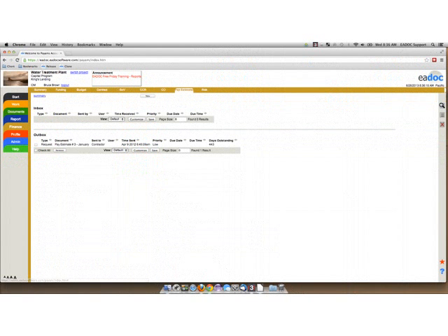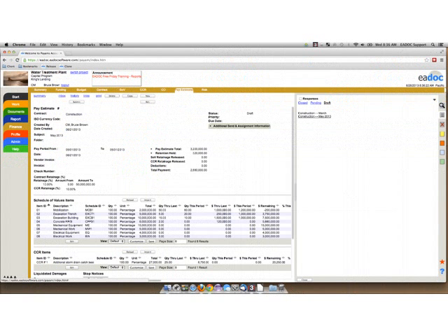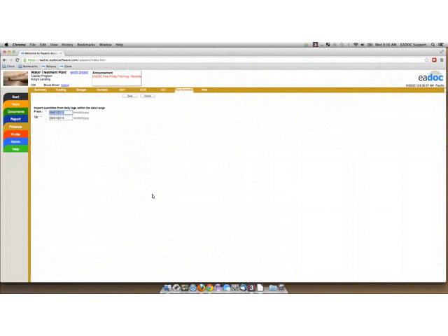And I already have one in draft. Pretty straightforward. You just click that New button and save. You define the dates and everything as usual on your pay estimate. And then you've got an import button down here. So you can see my quantities through last are coming in from my previous pay estimates. And then for quantities this period, instead of manually entering them in, I just want to import from all of the approved daily logs. So you do need the approval process set up for this.